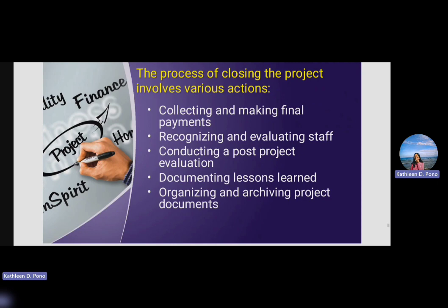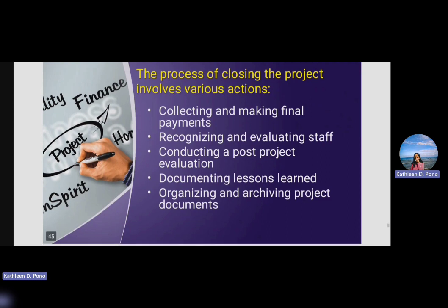The third one is conducting a post-project evaluation. This one is assessing the success of the project and identifying areas for improvement in future projects. The actions involved may include analyzing project performance data, reviewing project documentation, and conducting surveys or interviews with stakeholders.